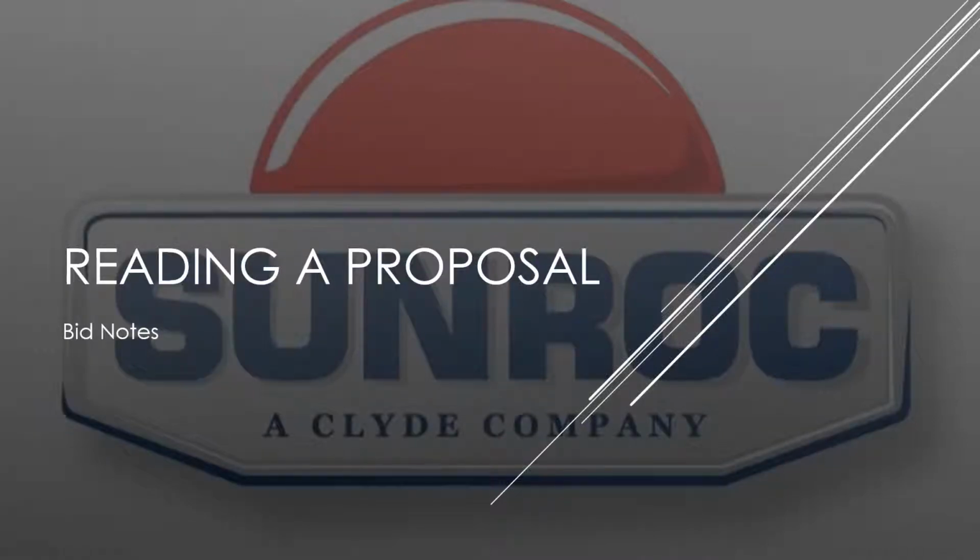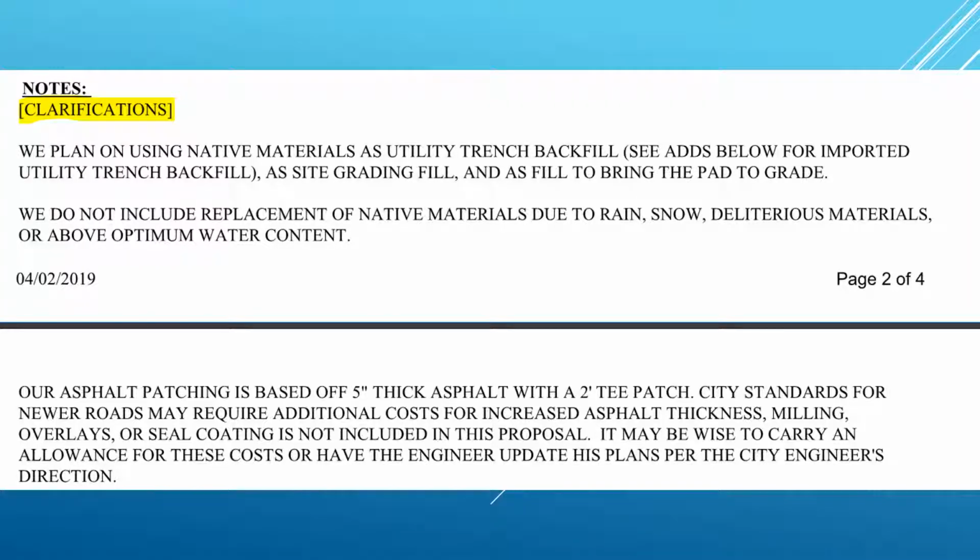This training is on reading a proposal, but specifically the bid note portion of the proposal. If you look at the highlighted portion, it says clarification. So at the very bottom of our bid, we like to clarify the specifics of the job because each job's a little bit different. Sometimes we may want to talk about things that are in the geotech report.